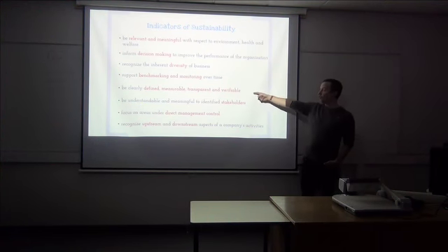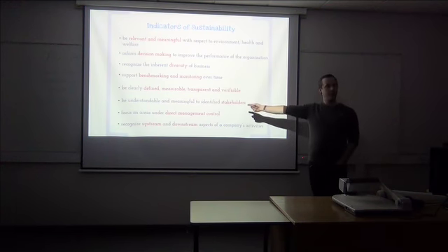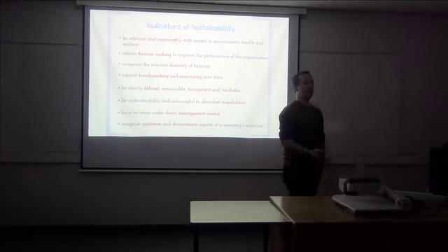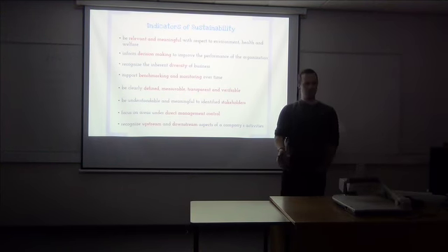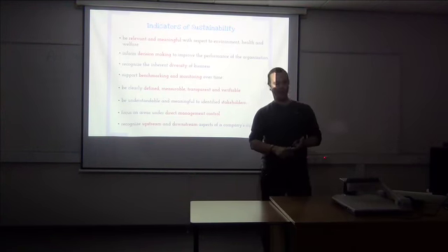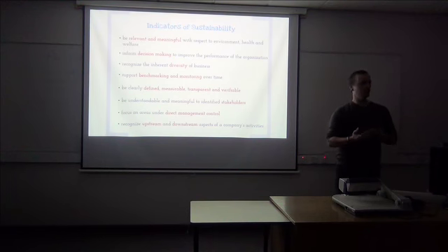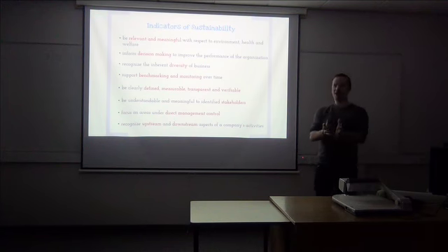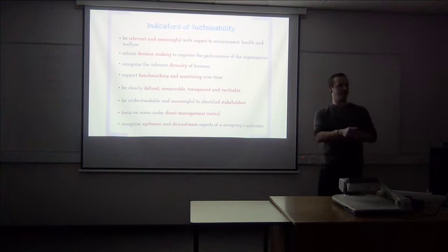This is something that I was very hot on in the tool I created that you saw before. I was very aware from other work I'd done that if I went to a particular developer or a particular industry guy and said, okay, we're measuring you on this, and this is how we're measuring you, he'd say, well, who are you to decide what the best practice for the amount of water that you can use in a building is? And I'd say, well, I haven't decided that. What's been decided through this government standard here, this industry standard here, these 3 academic papers. So all of the evidence, the indicators, nothing to do with me. What I did was pull the best practice evidence together and put it in one place. And I used to say, well, if you've got a problem with that, don't argue with me. Argue with the government, or argue with these academics who've come up with that system.